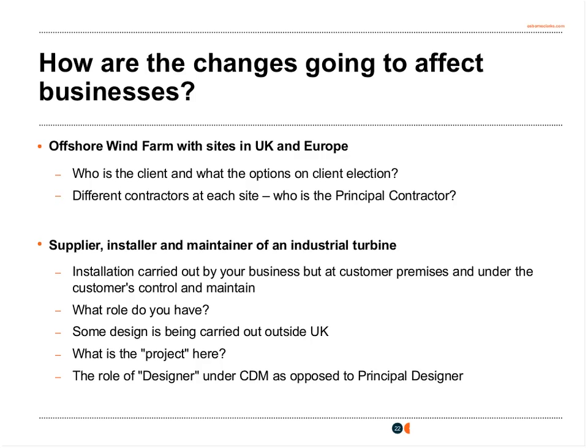Why do I say this? Well, if you look back at the definition of project under CDM, and that's something we haven't looked at in a huge amount of detail, you will note that it is intended to include all construction works, including planning, design management, and other work until the end of construction phase.